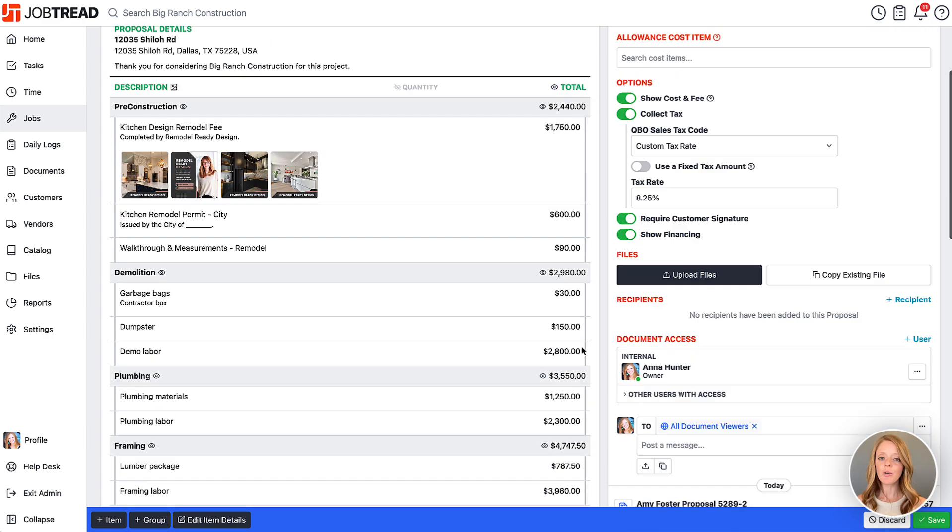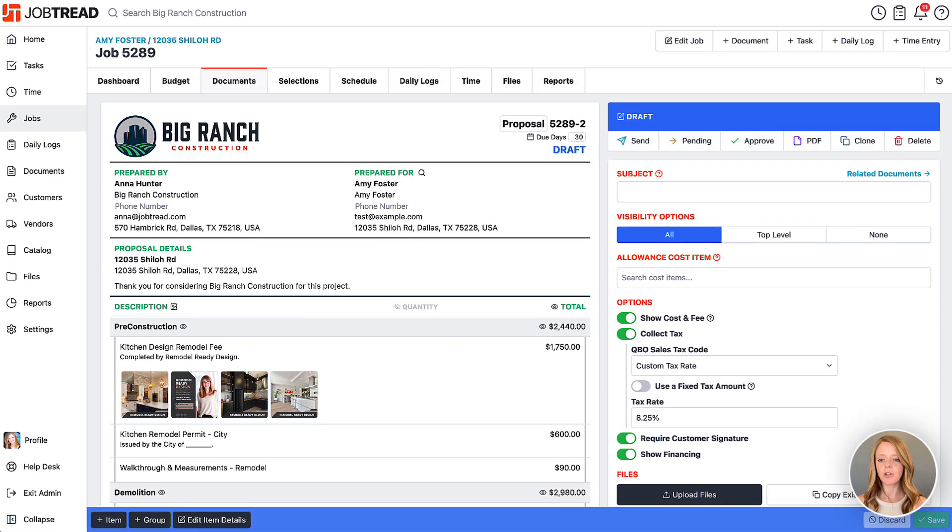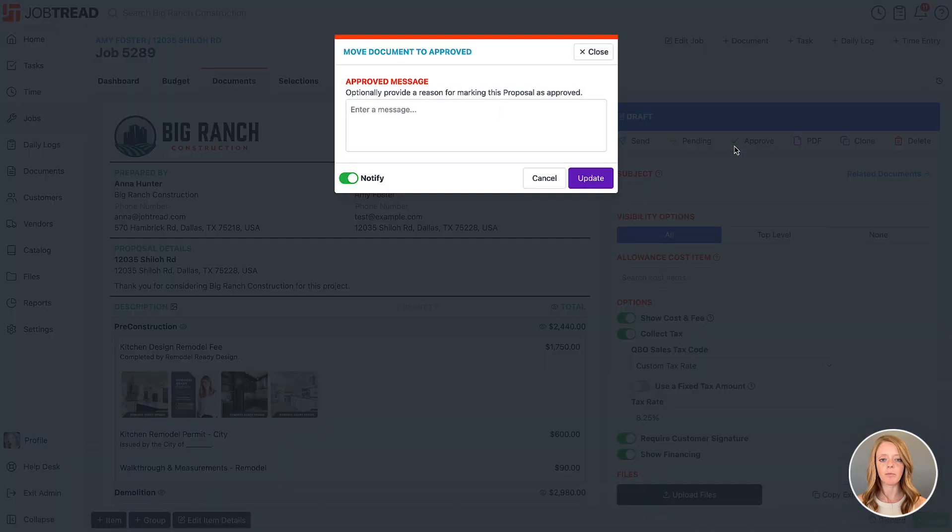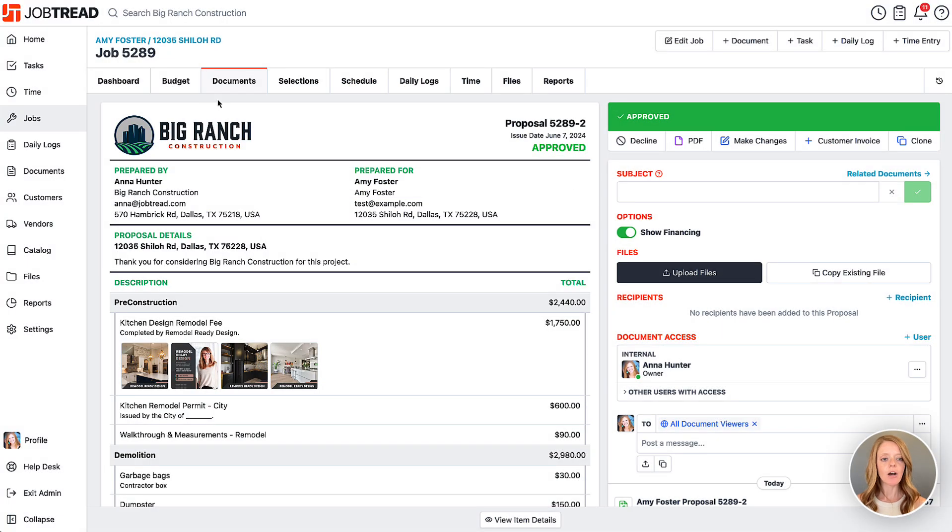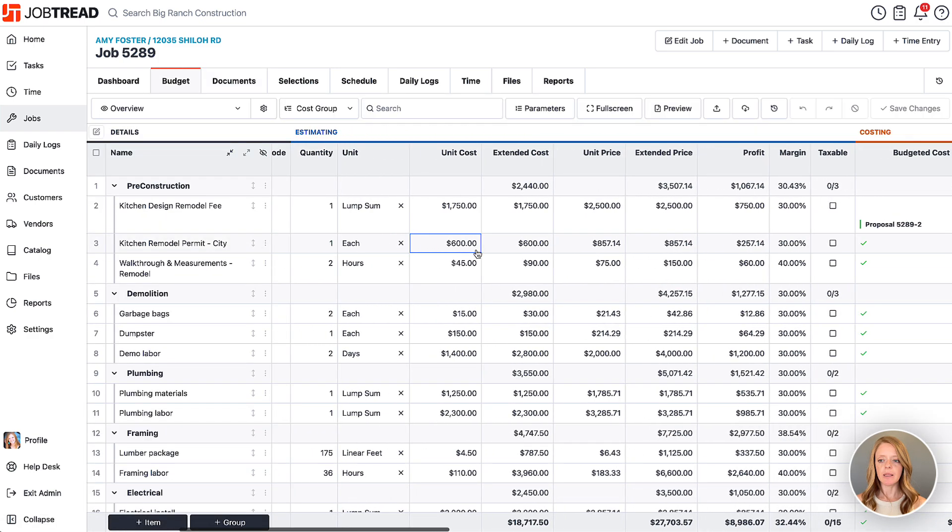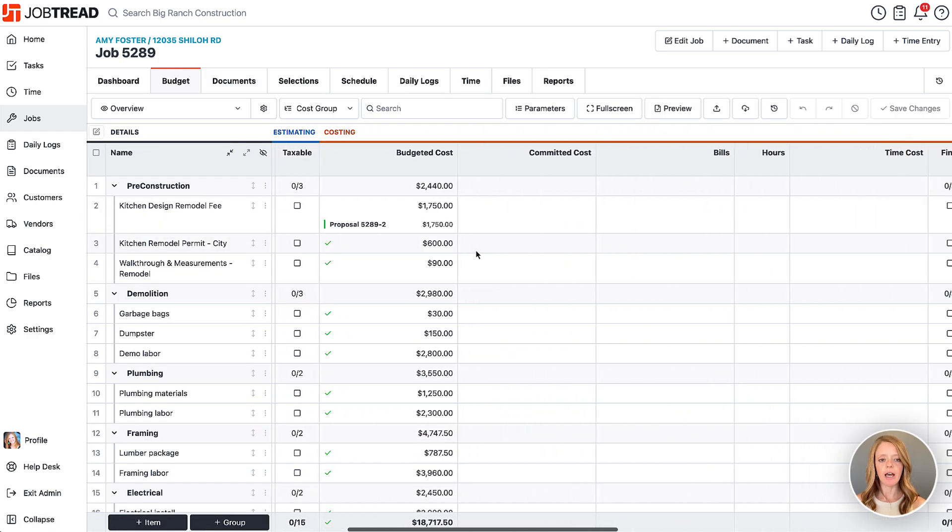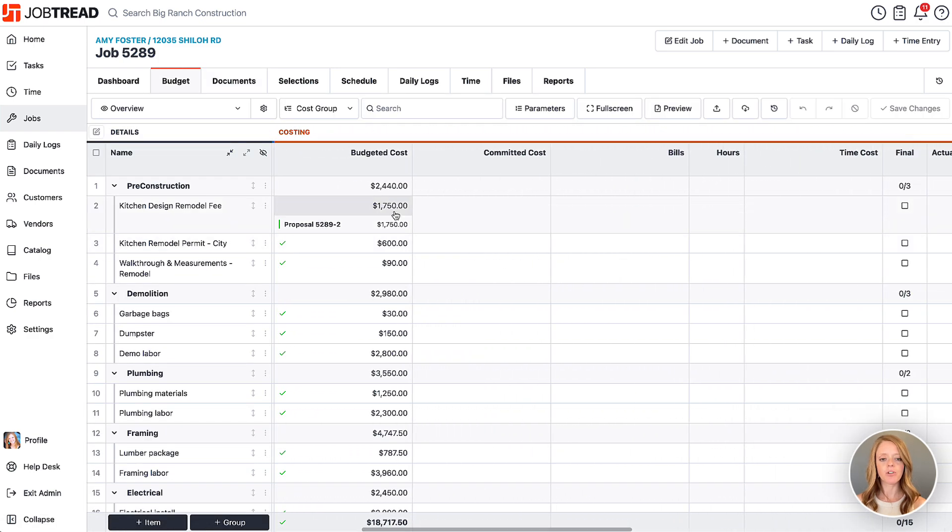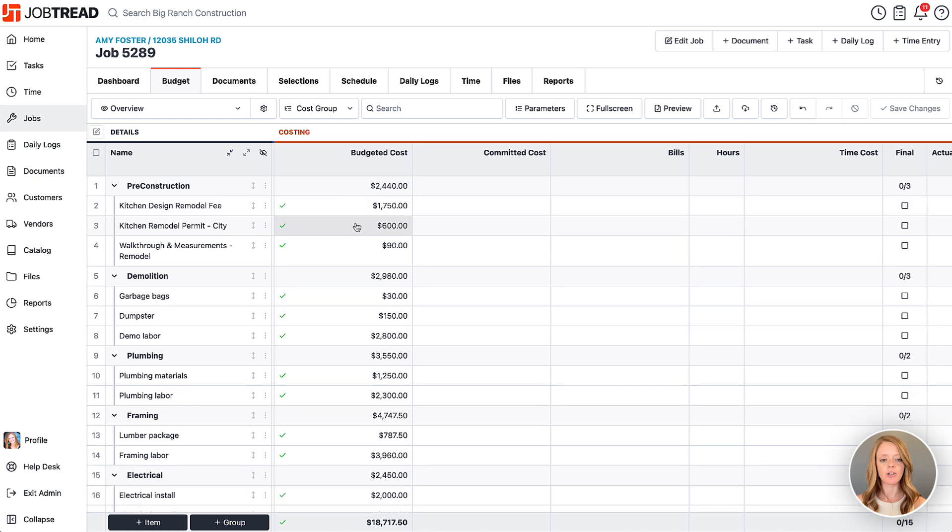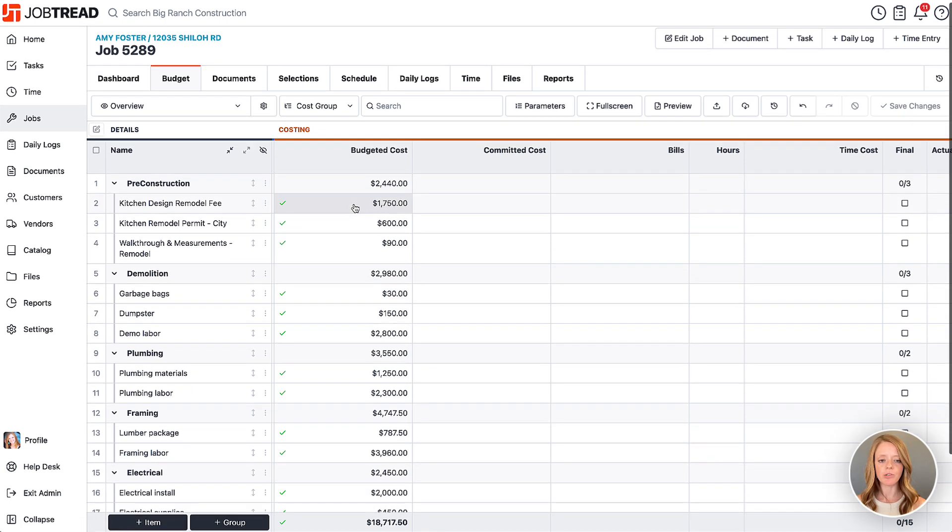Let's go ahead and get this approved here real quick. I'm going to jump into the approved state. Now if I go back to my budget, we're going to see in the job costing section I have an approved budgeted cost for this job that is informed by the proposal.